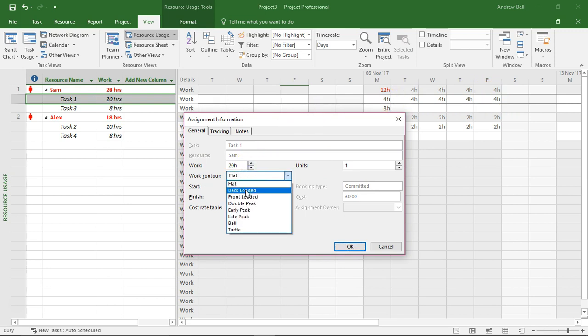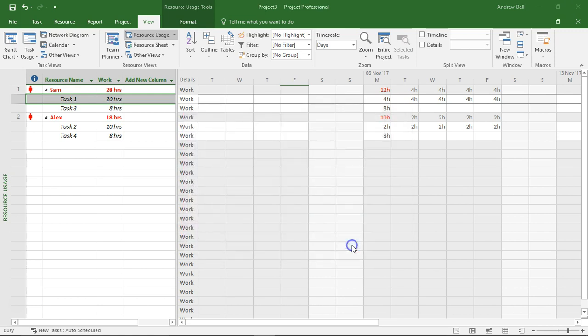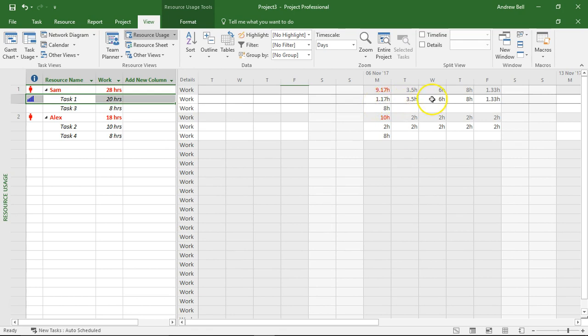But I can make this back loaded so Sam does more work towards the end of the task. So he's only going to do just over an hour on Monday but he's going to increase that to three and a half hours Tuesday, six hours Wednesday, eight hours on Thursday and then that just leaves a little bit at the end on Friday to finish the task.